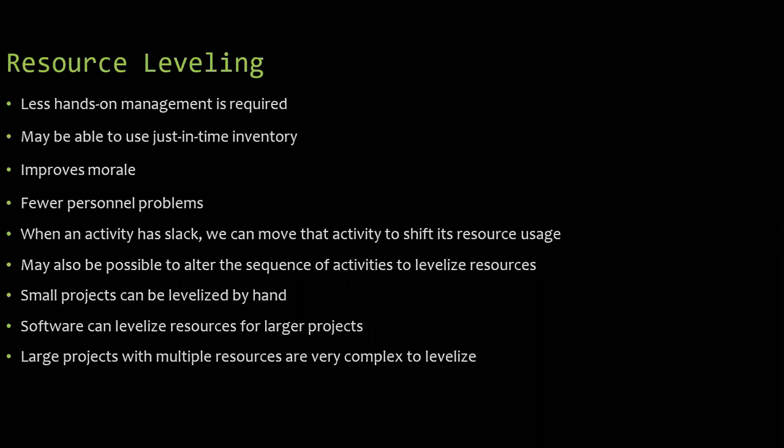And here we are not in a position to change the duration of the project. Once you complete the network diagram, you find the duration of the project, and that total duration is not possible to change. We calculate the total duration based on the critical activities on the critical path.